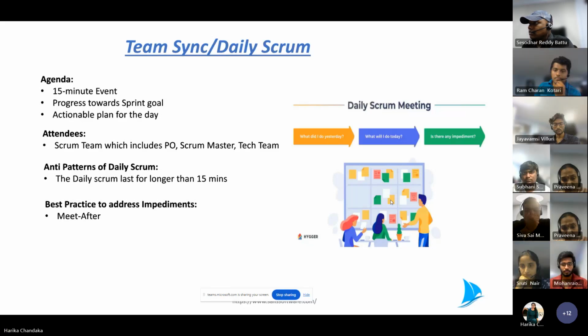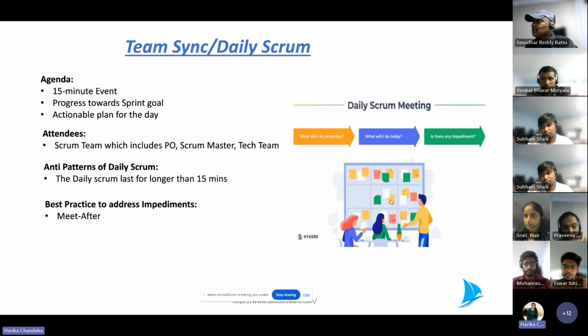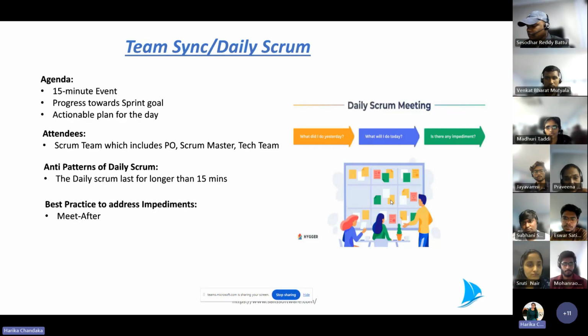Let's say we have a team of like 20. Can we break it into chunks and do a stand up? I don't know who is asking this, but this is ideally Surya Kumari. Hi. Ideally, we should never run such a large team. Whenever we're following Scrum, it should be 8 maximum. Yes, as you asked, you have the answer too. We always need to break the call into 2 different parts. So 8 to 10 is the maximum, and 15 minutes is the thumb rule for a scrum call. Okay. Thank you.